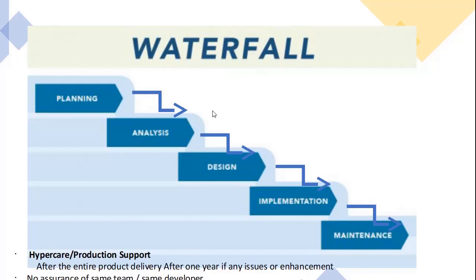What it means is, if the project deadline is one year, the first two months will be for planning, the next two months for design, the next three months for implementation, and the last one or two months for maintenance. So what will happen if any issues happen in between, or any requirements get changed in between, but the developers' requirements are different from the client's task? All this one year of time will be gone without the actual requirements fulfillment, right?